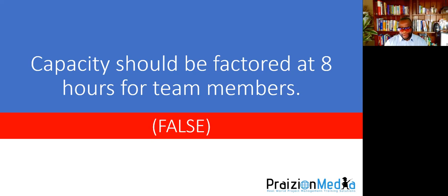Talking about an 8-hour working day, you don't work 100% on the project. So factor in 2 hours for things not related to the project, go with 6, subtract as needed.